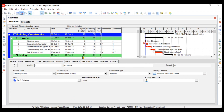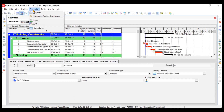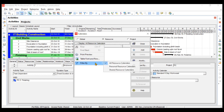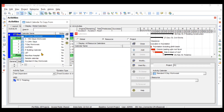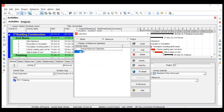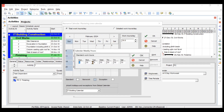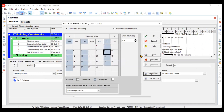Similarly, you can create a calendar for your resources. Go to Calendars, then Resource, and filter by All Resource Calendars. Click Add, choose our previously created calendar as the base, and name it 'Plastering Crew Calendar.' Modify it: the plastering gang works Monday, Wednesday, Thursday, and Saturday. In Work Week, mark Tuesday as off, and Friday as off, then click OK.